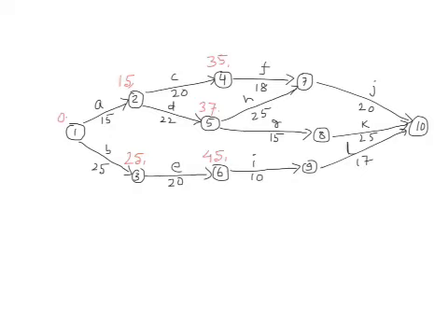We have to take the higher of the two because both the activities must be over, then only we will say that node 7 has come, means F and H both are over, and J can start from there. So 62 is the earliest time for node 7. For node 8 earliest time will be 37 plus 15 here, which is 52.